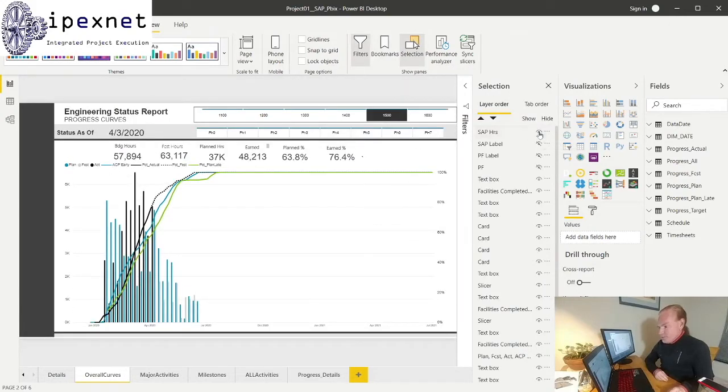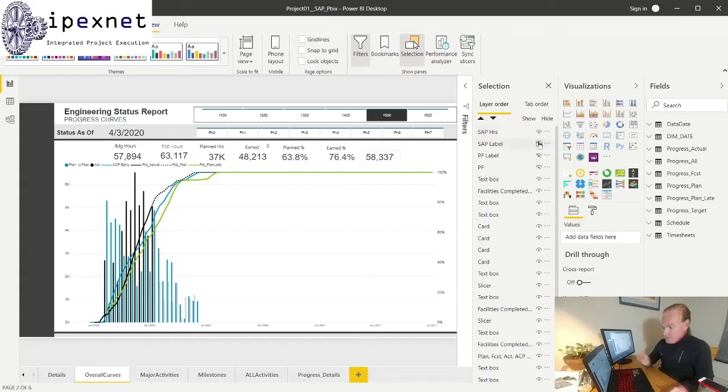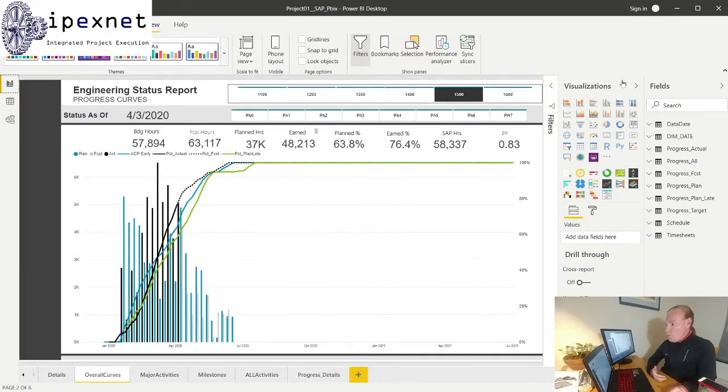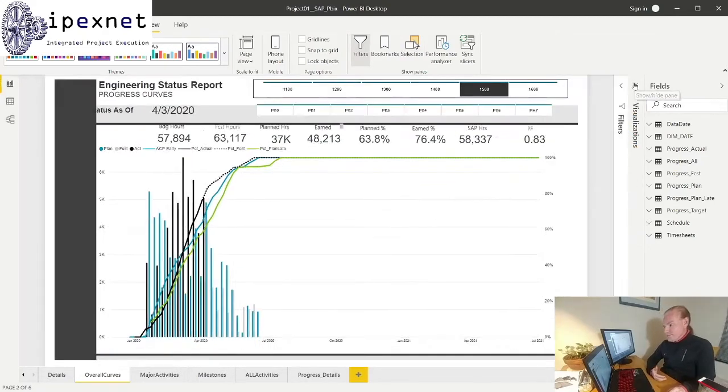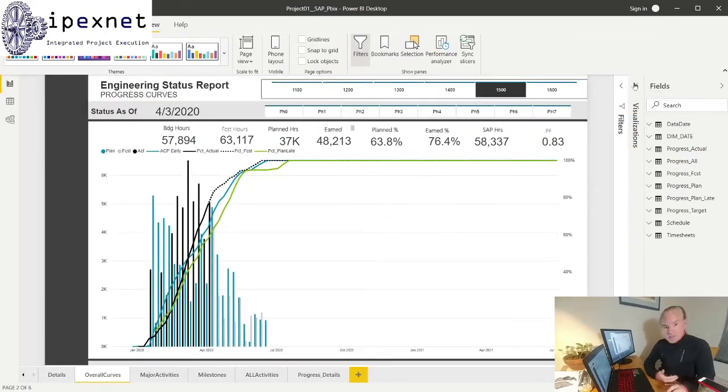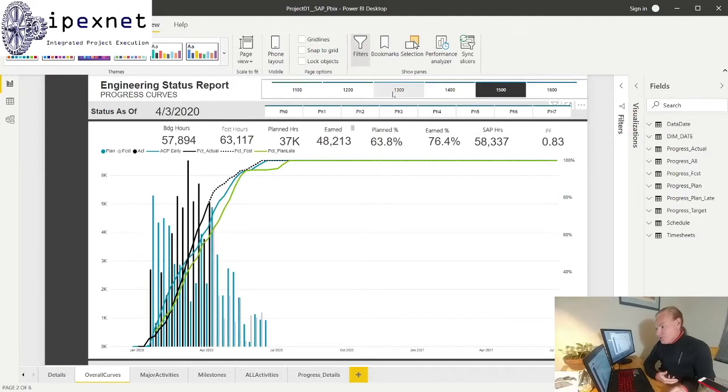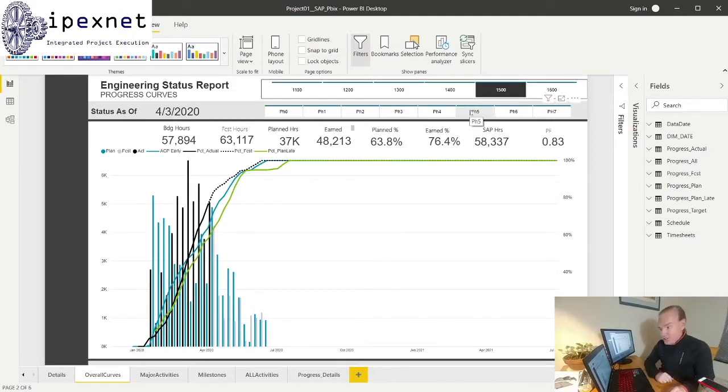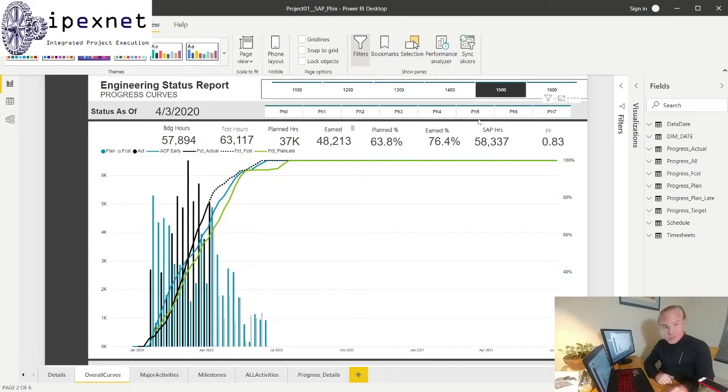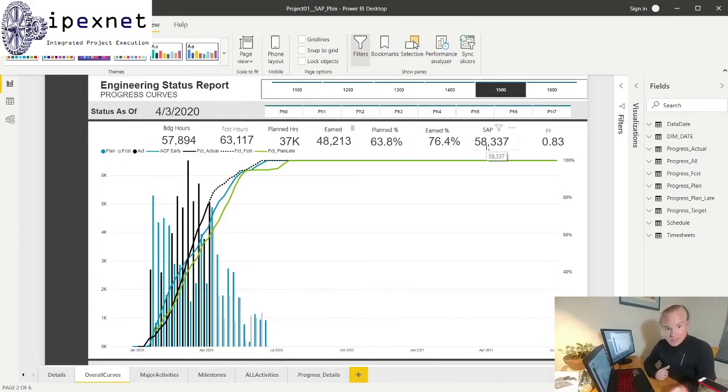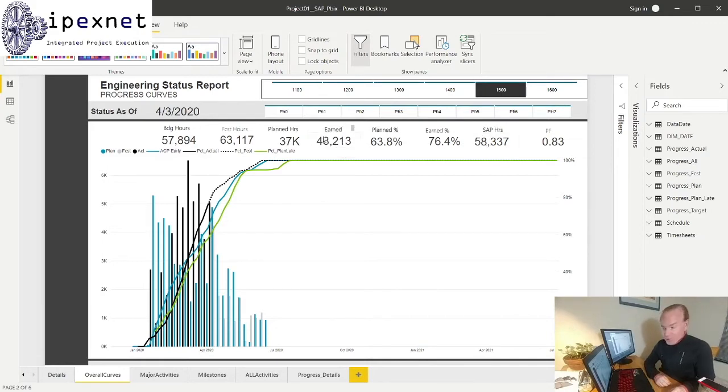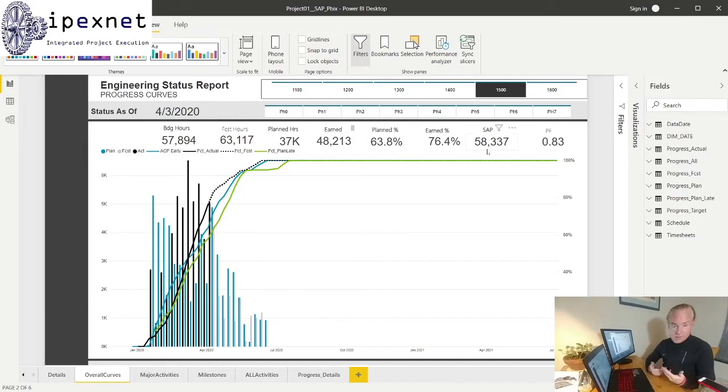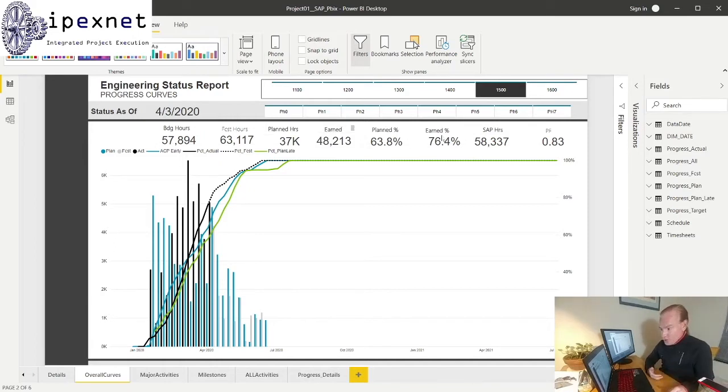So what are we looking at here? Same deal - we've got our project structure, a level one, level two, there is a level three WBS. In this case I'm only showing two, and based on any combination of that I can see how many hours I've spent. I can compare that to how many hours I've earned, and obviously the calculation for productivity is earned divided by actuals.